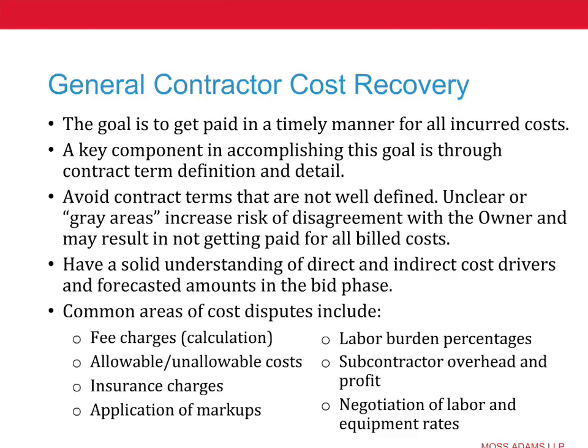And in terms of unallowable costs, that should be defined properly, and essentially a cost that you have to incur because of this project should really be falling into the allowable camp. That discussion is better to have up front with the owner than later on when trying to get paid and having issues with them. Insurance charges: we often see that there are questions about whether certain charges can be charged directly, what's included in fee, how it's handled. Make that clear in your contracts. How markups are applied to contracts is another area. There are a lot of areas to think about. We can't give you an exhaustive list of every single one, but I think the point is pretty clear, and I think we've made that point.